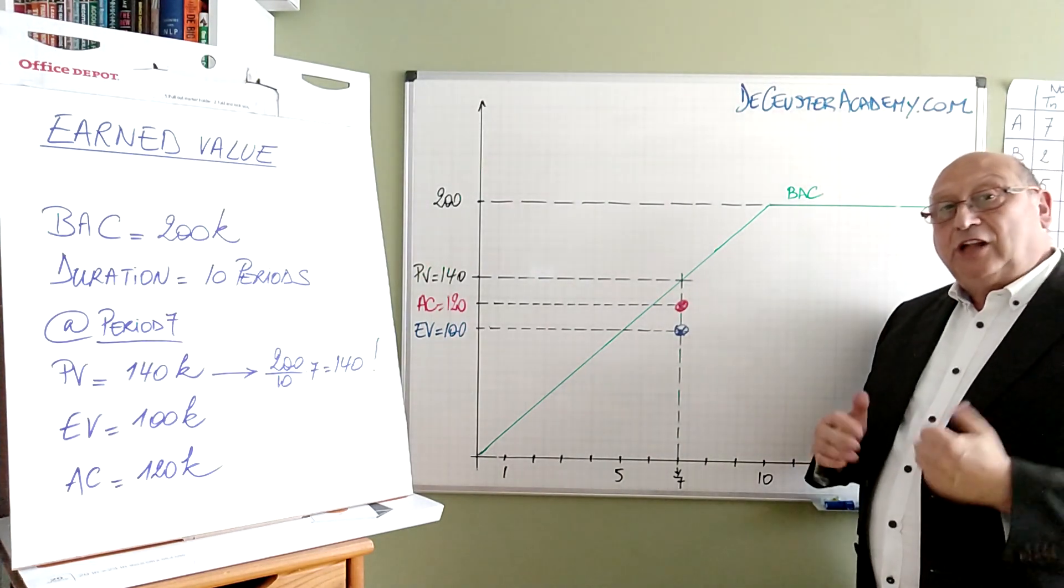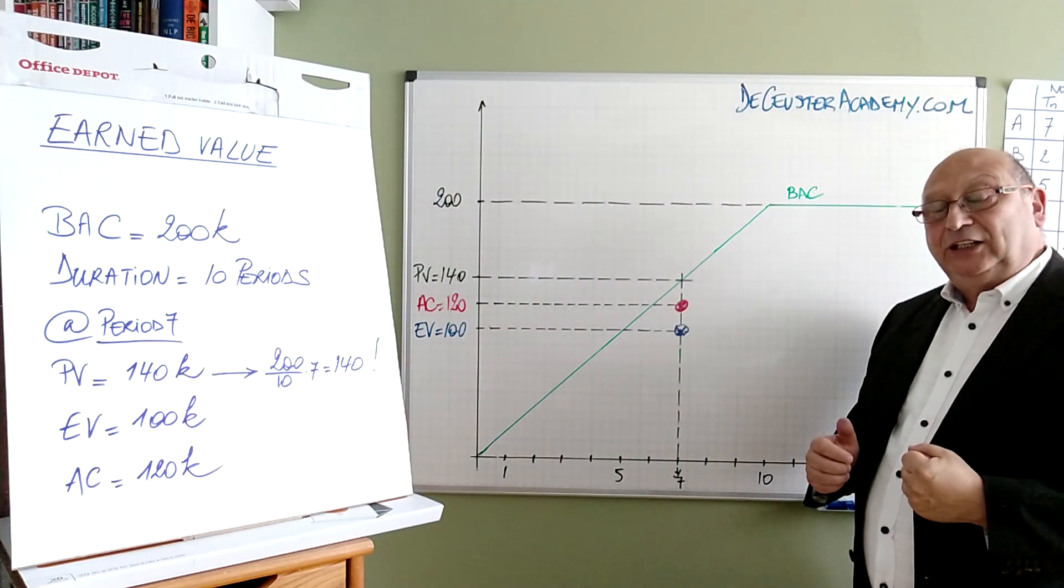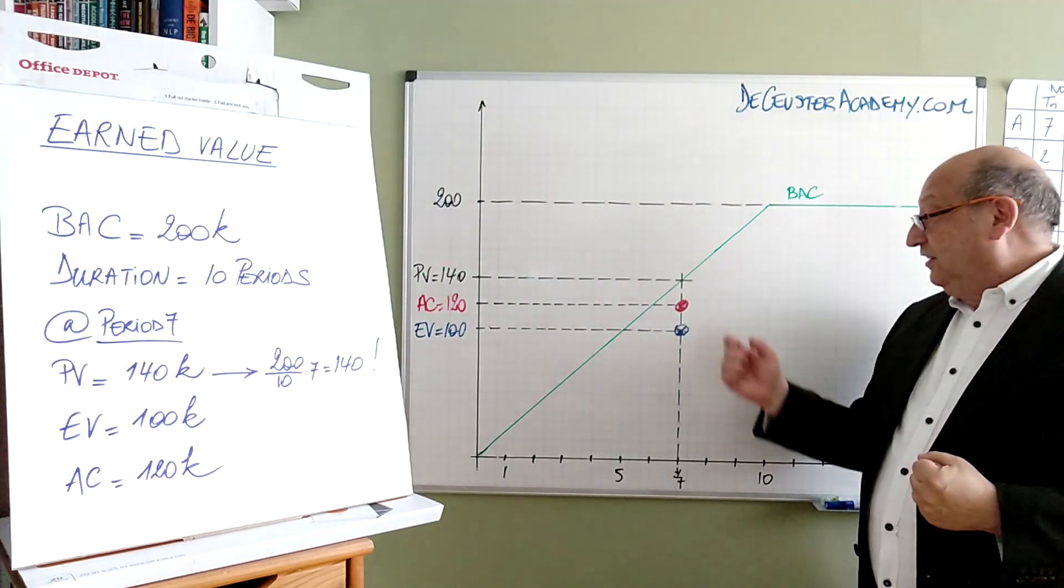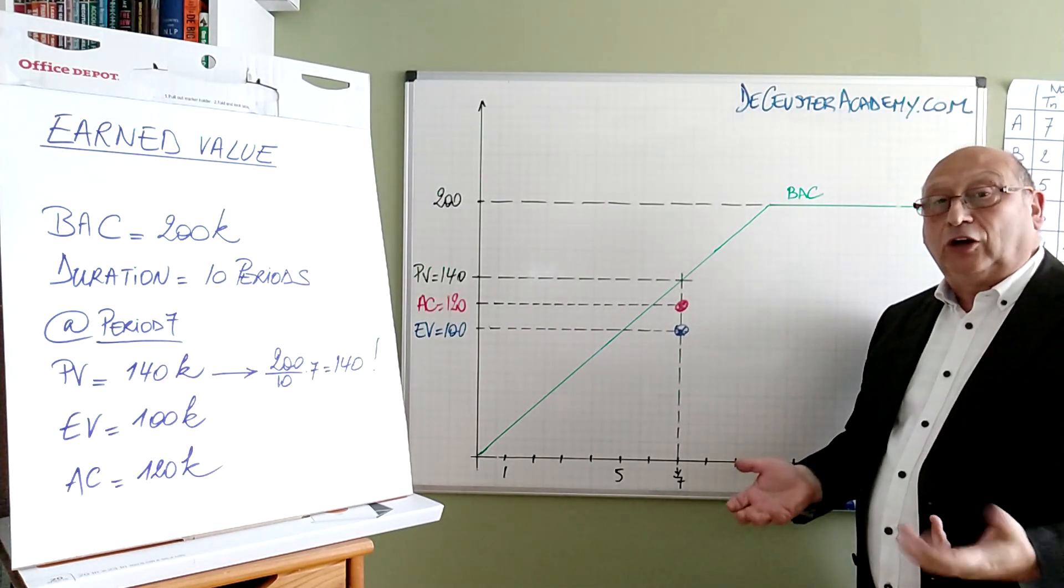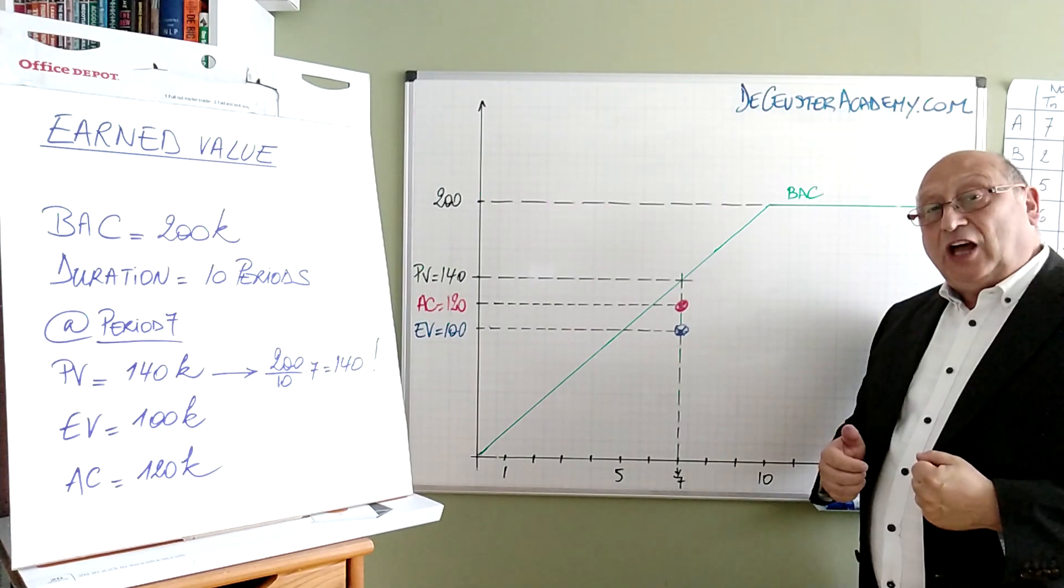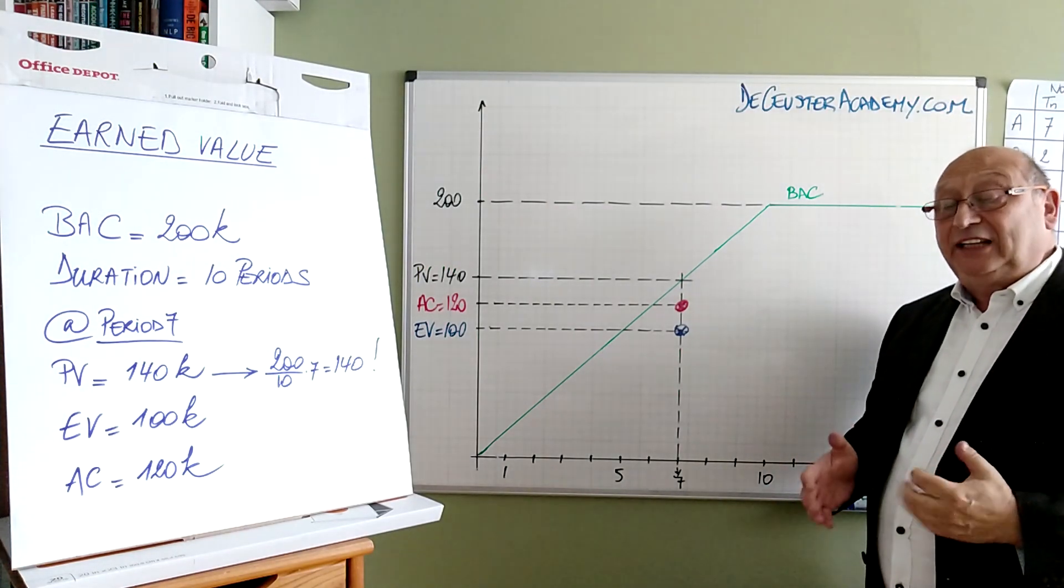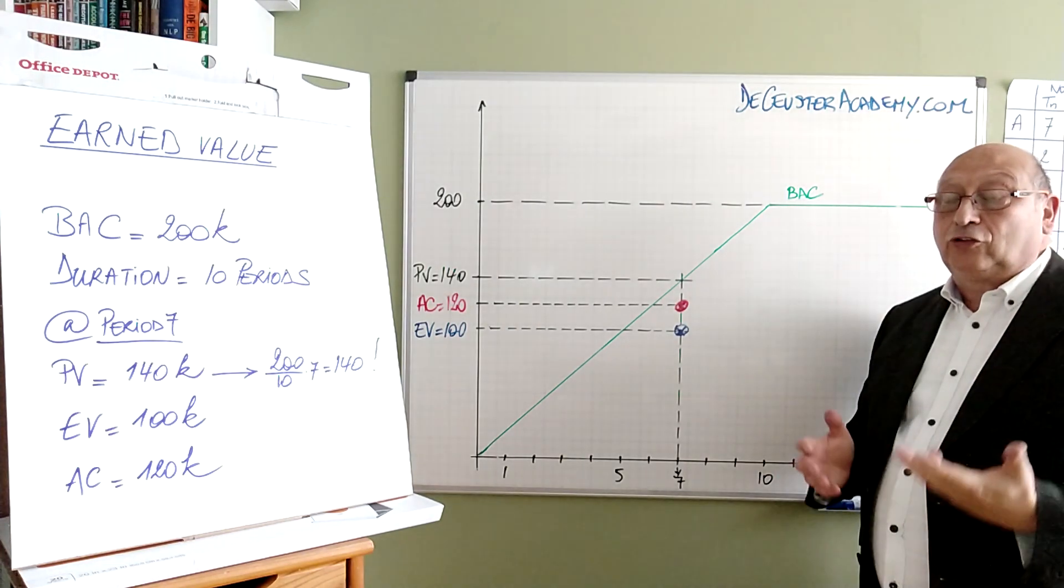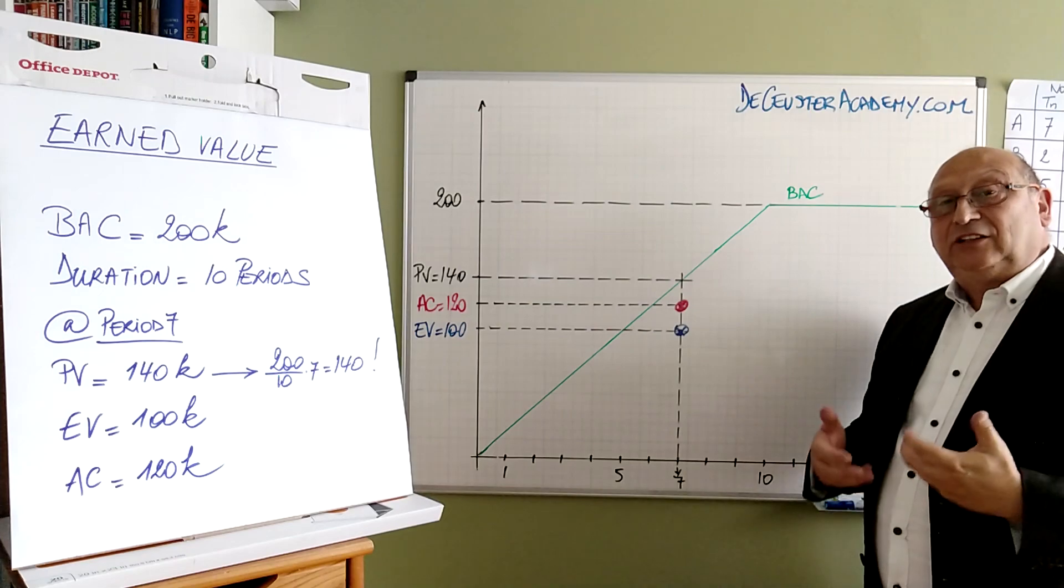This is the actual cost. Now when we look in a classical approach related to project management people would say this is great because we're below the planned value. We're below the cost. Experience however has shown that this is not always correct. In most cases this is not correct because we're forgetting some other parameter: the schedule.